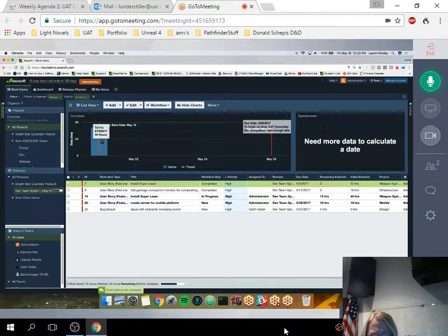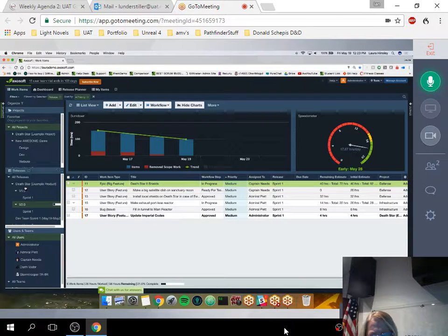So we have 34 hours. Axosoft will actually help you give this prediction of, based on the time that you roughly estimated these items to take you, and the due date of this by May 26th, your team needs to complete about 6 hours of work a day. So over the course of 2 days, we'll click on this V2.